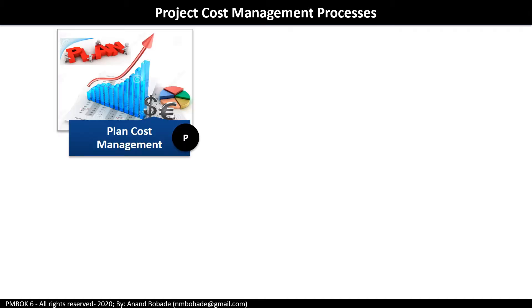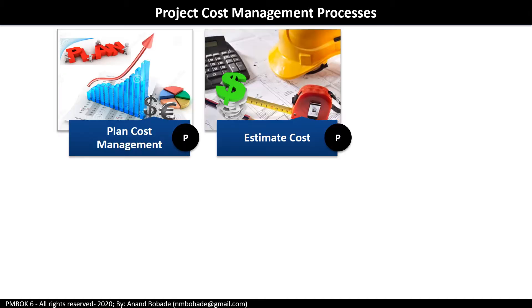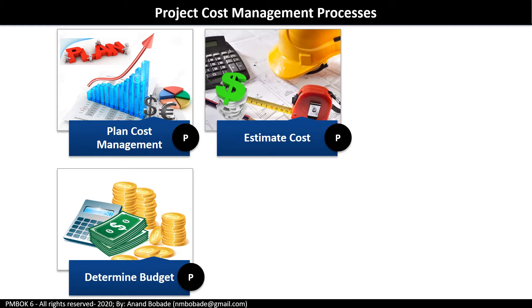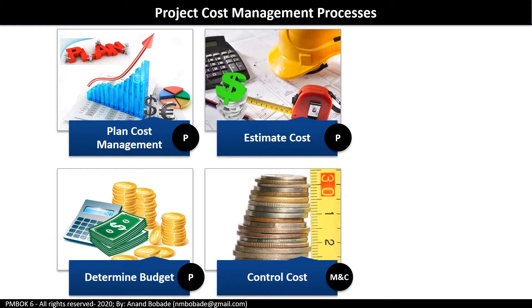We have four processes in the project cost management knowledge area. The first three processes are under the planning process group: plan cost management, estimate cost, and determine budget. The last process, control cost, is in the monitoring and controlling process group. The focus of this session is to learn the estimate cost process.